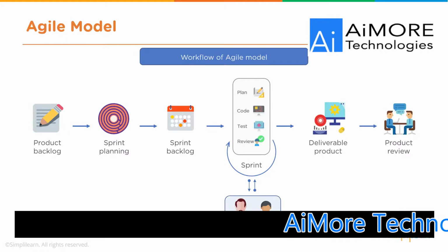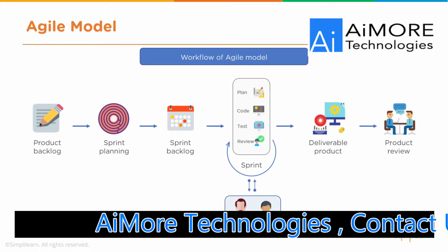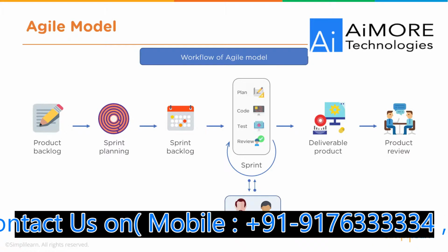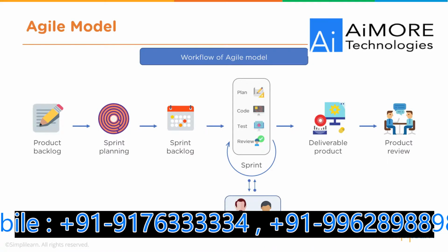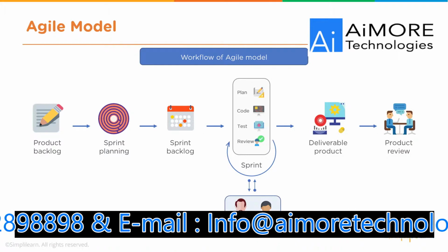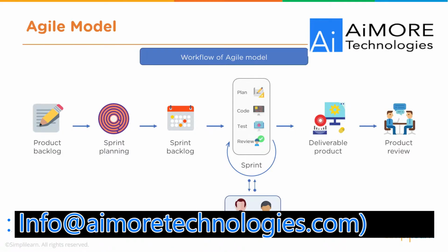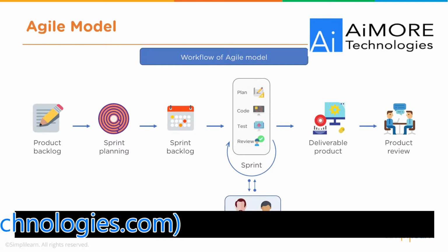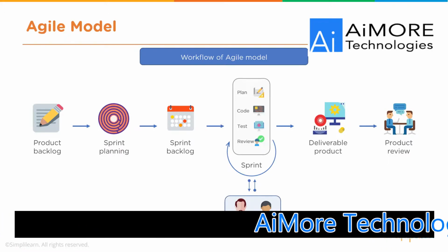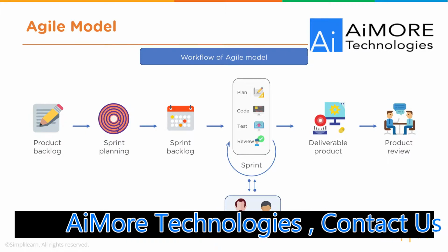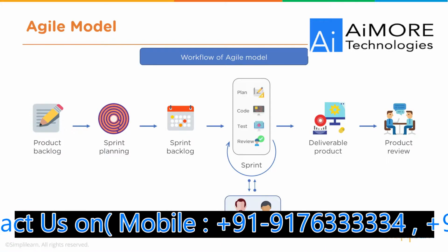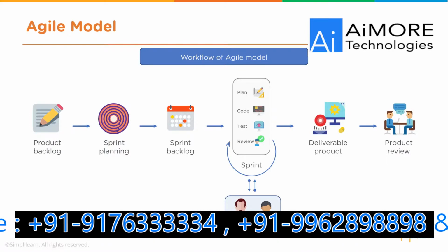What we have here is a breakdown of the ceremonies and the approach that you bring to Agile. So typically what will happen is that a product leader will build out a backlog of products, what we call a product backlog. And this will be just a whole bunch of different features, and they may be small features or bug fixes, all the way up to large features that may actually span over multiple sprints. But when you go through the sprint planning, you want to actually break out the work that you're doing so the team has a mixture of small, medium, and large solutions that they can actually implement successfully into their sprint plan.